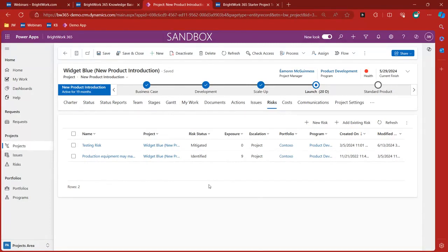The project manager gets all of the team members, maybe some stakeholders around it, literally like around a table or a virtual table, wherever you're located. And you say, okay, I want everybody, we're going to go around the room. Everybody tell me all of those things that happened on a similar project that you wish didn't happen. These terrible things or these issues actually came to pass. Tell me about it now. We're going to put that on a risk list before we even get started fully on this project, and we're going to manage those risks to hopefully prevent them from becoming real issues later on.